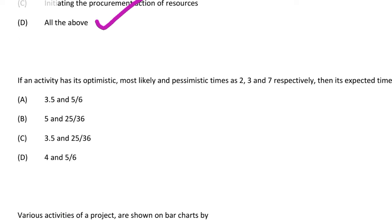Next question: if an activity has optimistic, most likely, and pessimistic time as 2, 3, and 7 respectively, then the expected time and variance are respectively — option A 3.5 and 5/6, option B 5 and 25/36, option C 3.5 and 25/36, option D 4 and 5/6. The correct answer is option C, 3.5 and 25/36.